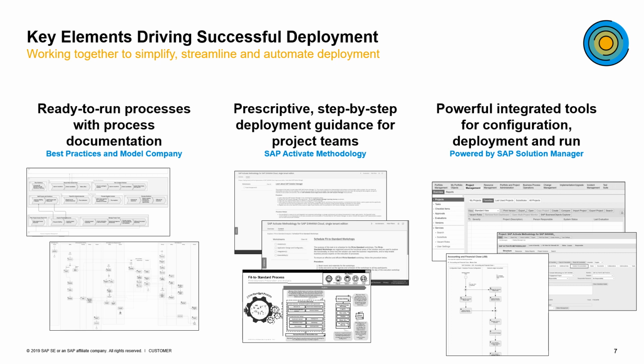The decisions made throughout the roadmap should then be highlighted as well as recorded in a tool such as SAP Solution Manager, or any other tool within the S/4HANA application that can help capture the key decisions that the customers are making along the implementation journey. We want to make sure that we capture the key design decisions so that, moving forward, we will be able to keep track of what changes have been made, which will make for an easier upgrade.